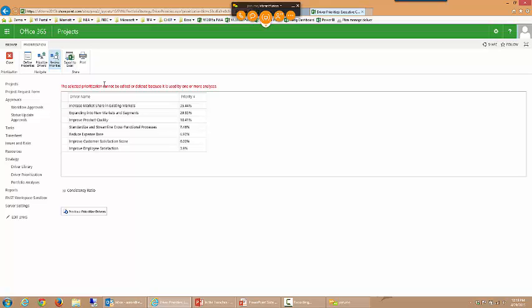Okay. And I'm going to show you the drivers that have been selected: increasing market share, expanding into new markets, improving product quality. And here's how they rank. Basically, here are the weights that are assigned to each of these drivers. So if a project scores very well against increasing market share in existing markets, it's going to get a big boost in the portfolio analysis.